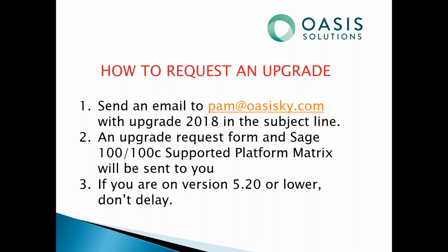So if you are knowing now that you want to upgrade in August because that's your slow month, what I would suggest that you do is go ahead and make the request now. We can get the pre-upgrade analysis completed, get you the scope of work and estimate, get it approved, someone assigned, and they'll know that you want to upgrade in August. And then there won't be any issues with any lead time.